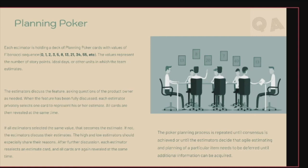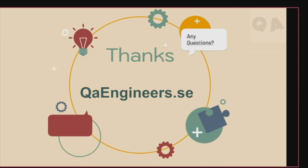This process is repeated until everyone reaches the same level of points. For example, if four people raise five points and two people raise two points, the product owner goes with the majority — five. Through this process, the team has a proper discussion and understands the ground reality of any task. Even if one person has doubts, the discussion helps bring everyone to the same page, increasing productivity. That covers the five agile practices for today, and future videos will cover the next set of agile practices.